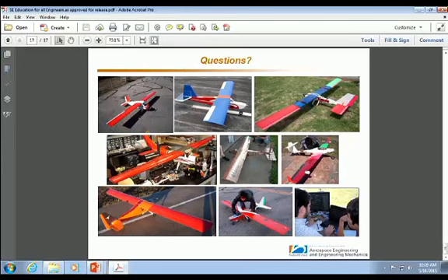How do you teach people so that you have these lots of design situations? Well, the first time through requirements, I try to turn it into a relatively mindless exercise. Step one is to find them and write them down, so it's a matter of taking them out of the document and pasting them into a spreadsheet. And then they have to go through and decide how they're going to deal with it.